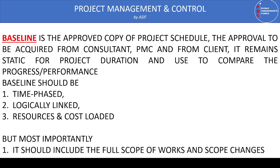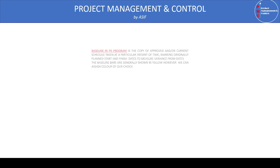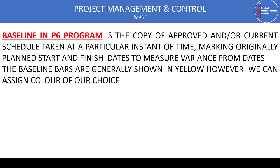In P6 software, the baseline program is a copy of the approved program made at the commencement of the project, approved by all stakeholders. In addition, if there are any major changes or variations during the lifetime of the project, we make a snapshot of the project. This snapshot is also a copy of the program at the point when those changes or variations are made.